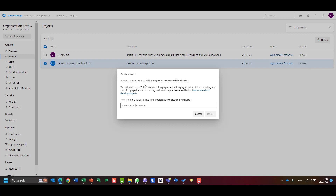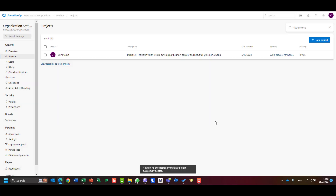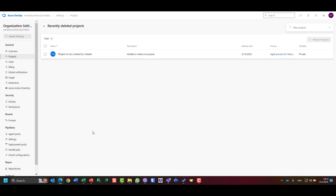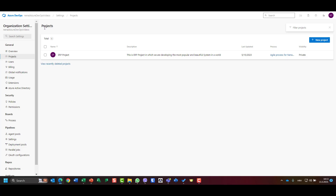I'll select the project and click Delete. It will ask if you're sure — you have 28 days to recover the project — but I'll confirm and delete 'Project Number Two Created by Mistake'. You can see it is now deleted. If I go to recently deleted projects, I can see it there, select it, and restore it — but I'm not going to do that.